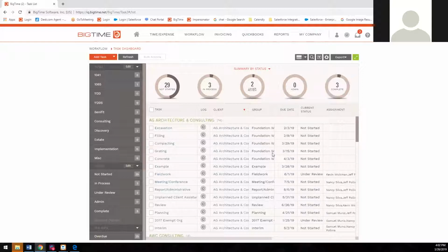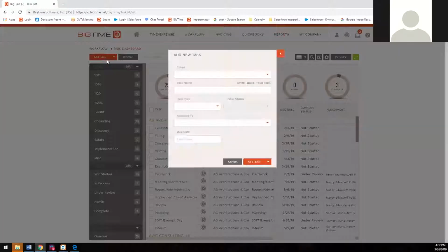You don't really want to update the budget for the work you're doing. You really just don't want to jump into any task and just up the fee budget. You want to be able to track any new addition per your project. So when that does happen, you do want to just select Add Task.